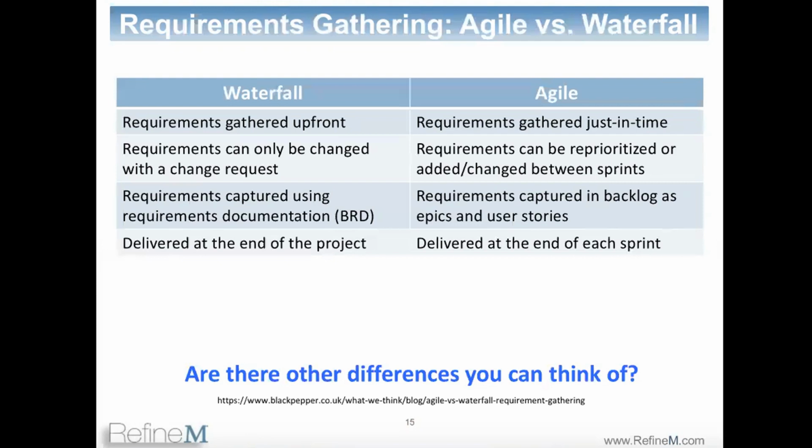So you have your time and cost fixed. I think you may remember my diagram from one of the trainings that you attended, the inverted triangle. And that's a very hard concept, a very hard mindset change. So there is nothing like scope creep in Agile projects. If you have new requirements, they are added to the backlog wherever they go in the order of priority, and the team keeps working on the highest priority requirements from the top of the backlog.